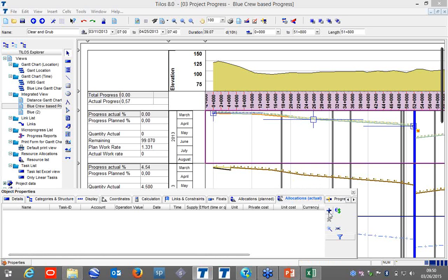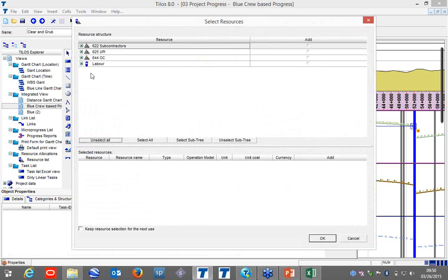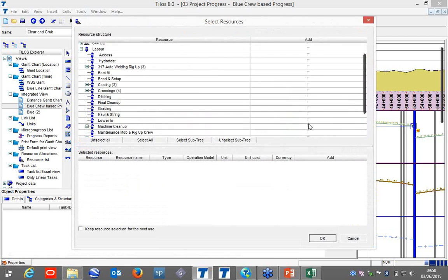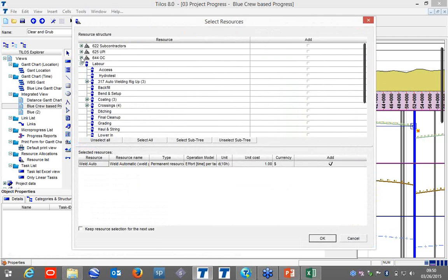And now you can import these values from Excel. How many machines are used, how many man hours are consumed on the site, we can all use, or in the system we can simply put that, for example, saying that labor using which machine you can select here, grader and machines you can select from here, and you can select your materials as well. Okay,